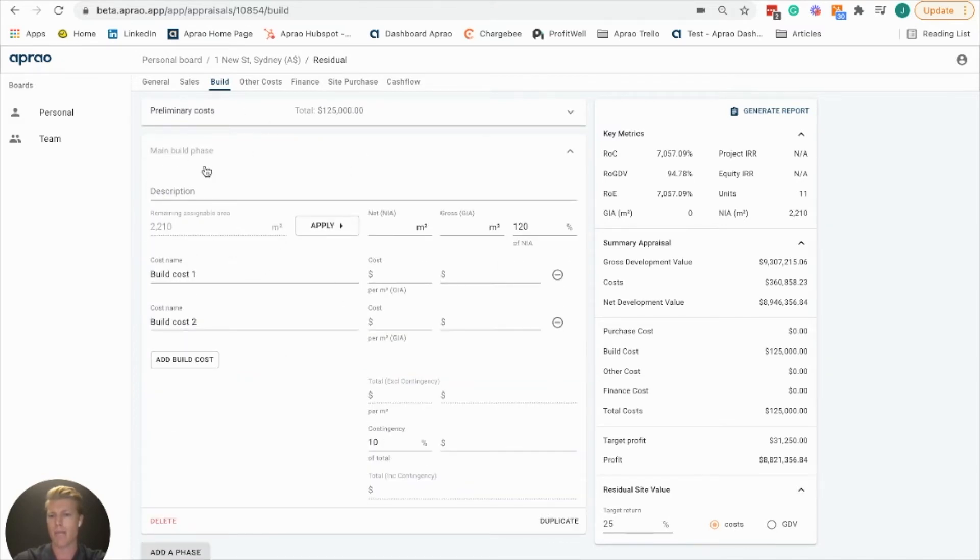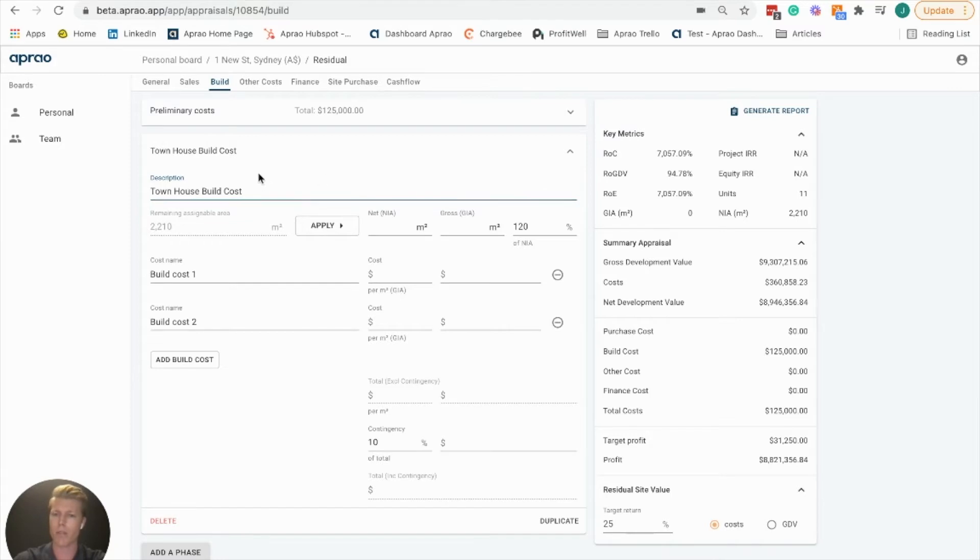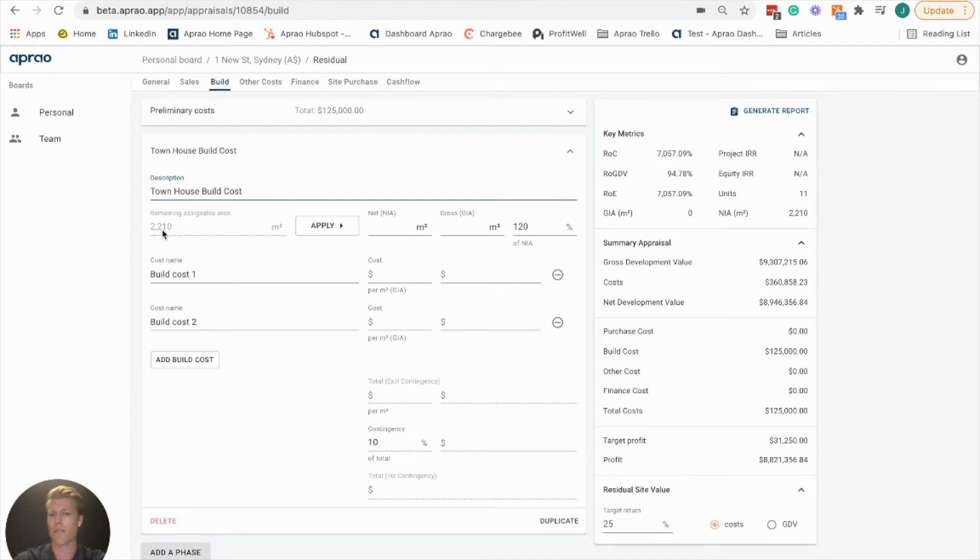Then we move into the main build phase. We're going to continue with our townhouse build cost here, and you're going to see this automatically filled in 2210 square meters. This is pulling the total area from our sales tab.